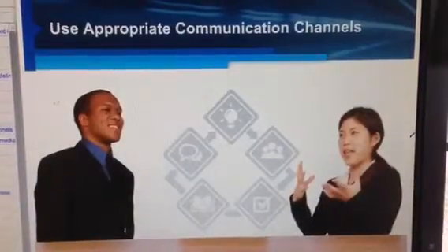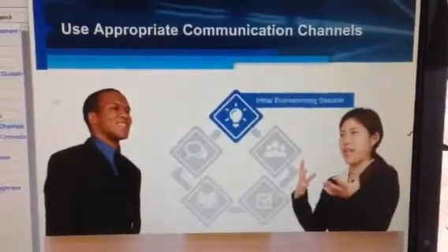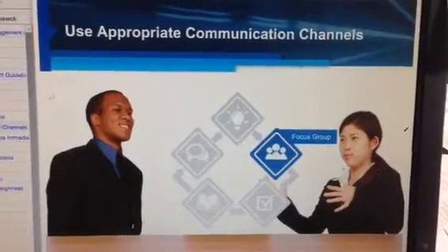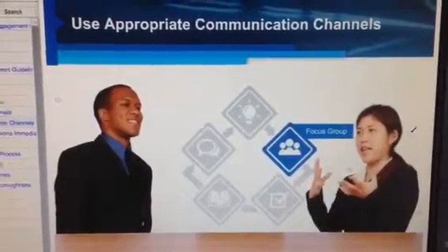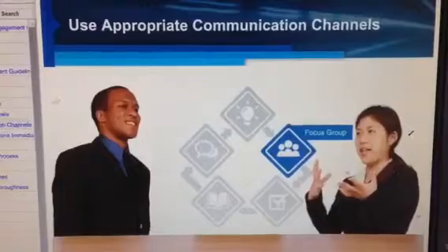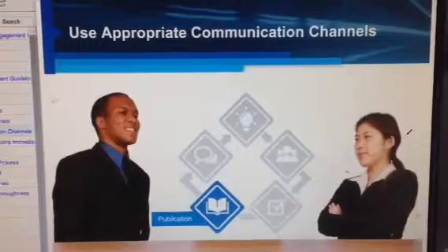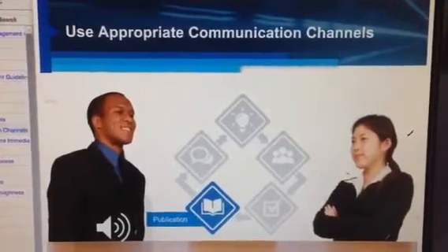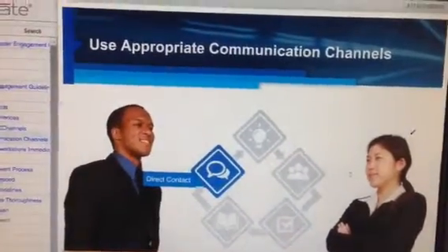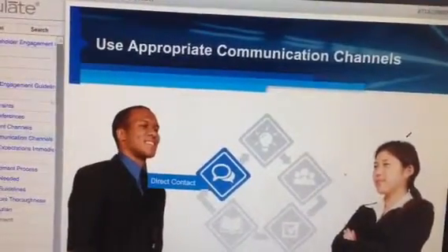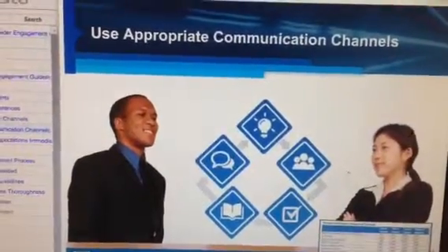That might work well. Usually I hold an initial brainstorming session with a few key people to get the ball rolling. Sometimes I use focus groups to get in-depth information from select key representatives of stakeholder groups. If the stakeholder group is large and I want feedback on a regular basis, I might conduct regular polls or surveys of that group. As I begin to send out publications and other forms of communications regularly, previously unidentified stakeholders begin to contact me as well, frequently because someone's passed the information along to them. Here's a list of channels I refer to when planning engagements. Click on the spreadsheet to enlarge.